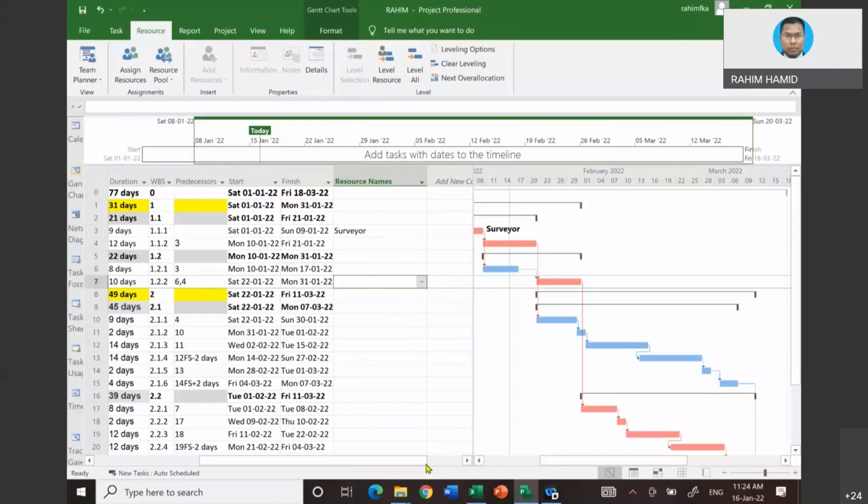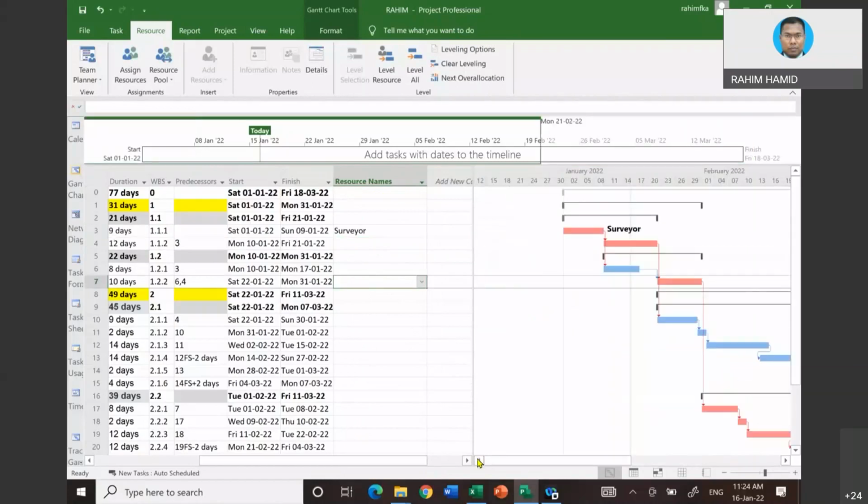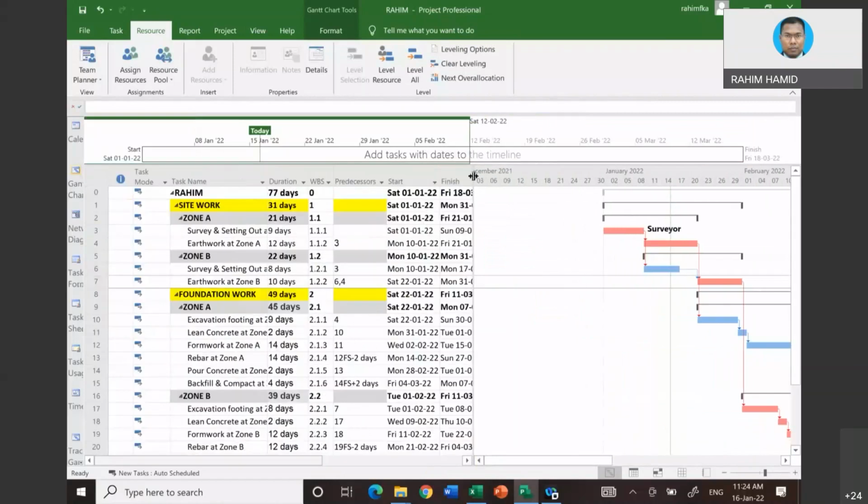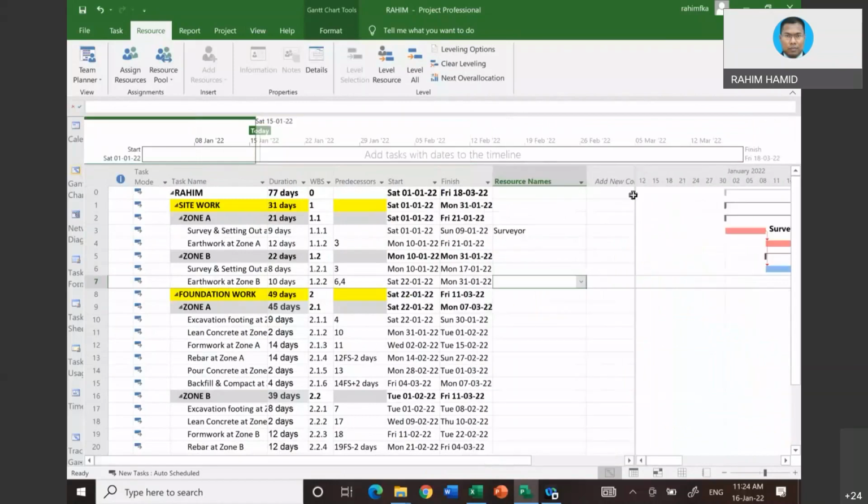First thing first, you must select the activity and then assign the resources so that the dialog box will appear, and then you can input the right unit in terms of the manpower, in terms of the machine, and in terms of the unit of material. Okay, that is what I mean by inputting using assigned resources.